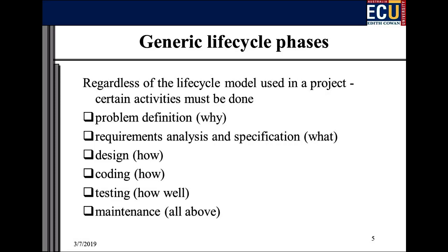No, I mean, as an example, to make it more relevant to the people doing OA&D, the first phase in the unified process, what's it called again? It's called Inception. It's not like that movie where it's the dream in a dream, but it's where you're actually evaluating, should I even do this project? Should I take on this work? Right? What actually is the problem domain?